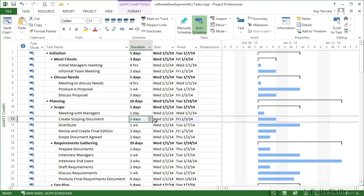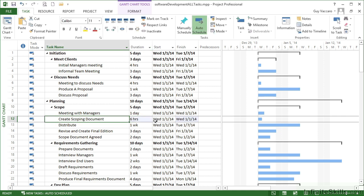Let's get things sorted and do that in six hours. I can just type 6H over the top of the cell, and when I then move either left, right or down, that six hours is then accepted into the cell and you can see the adjustment over here on the Gantt chart. We now have a six hour bar.